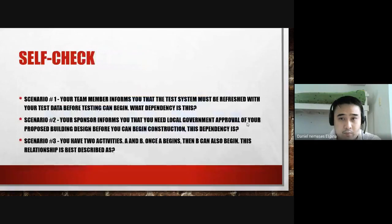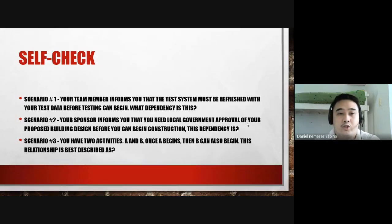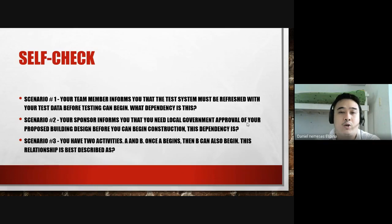Self-check: Scenario one — your team member informs you that the test system must be refreshed with test data before testing can begin. What type of dependency is this: external, discretionary, or mandatory? Mandatory means out of physical necessity. Discretionary is suggestion only, not physical necessity. External is imposed from outside the project team.